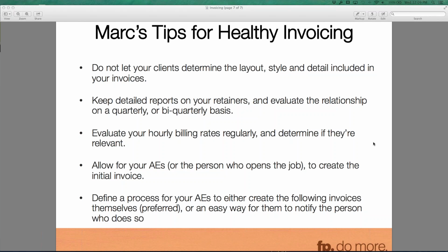So you're going to want to make sure that you have an agreement with the client that every 3 months or every 6 months you're going to look and see how over or under you are going on your retainers and reevaluate that relationship. As much as you don't want to be overworking on a retainer, you also don't want to be underworking either. Because if your client determines one day that, hey, this retainer just isn't worth it, as opposed to lowering the amount, they might just cancel the relationship altogether. So that's an important one to be doing.